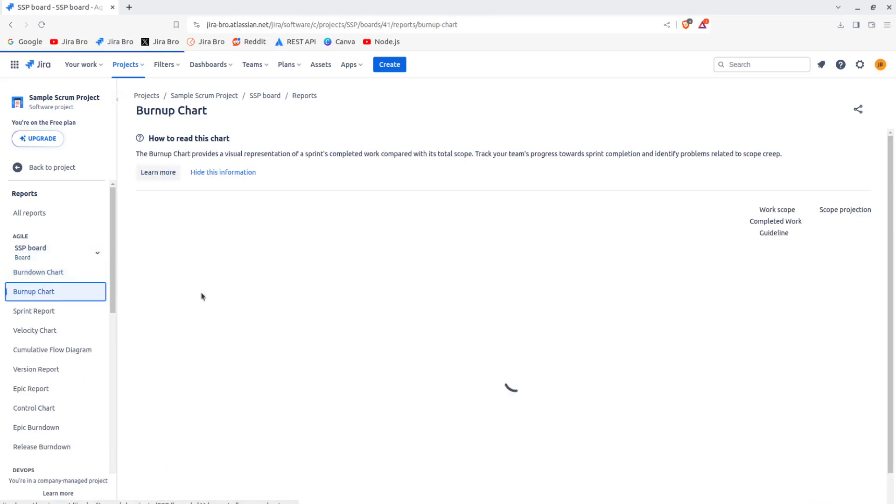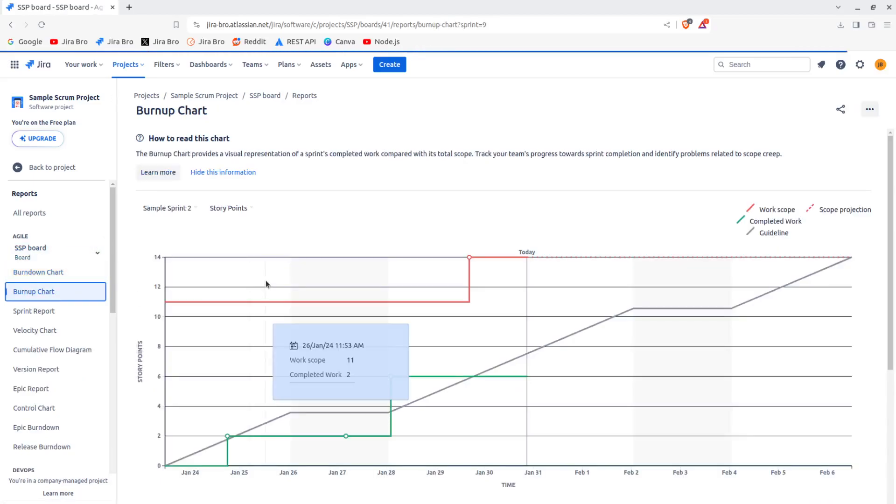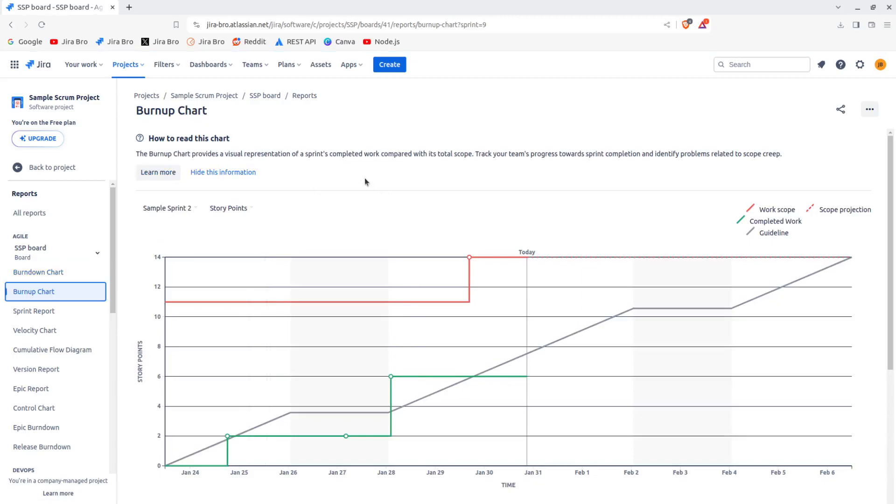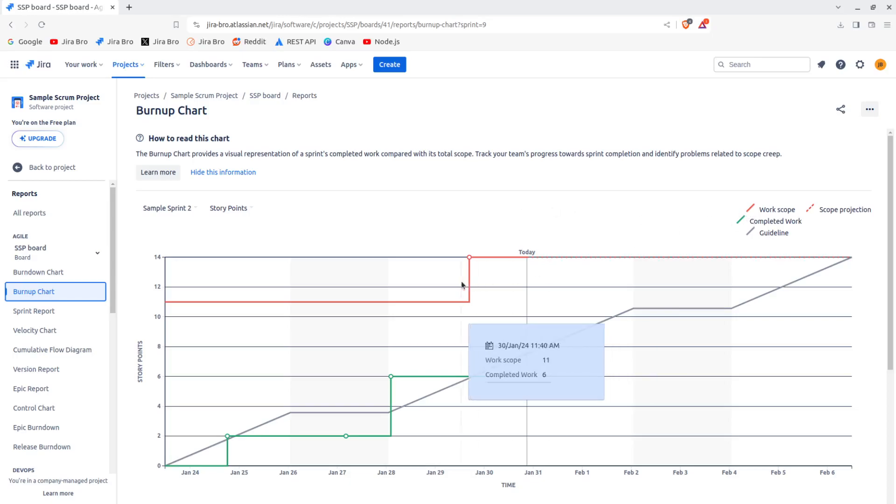Then you have the burnup chart, which represents a visual representation of sprints completed work compared with its total scope. This is a pretty interesting thing to have. So you have work scope, and you have completed work. It says work scope of 14, completed work of 6.